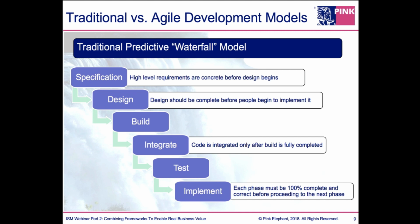We've got to make sure, especially when we have a tightly coupled build, that we have dependencies outlined, that we know specifications for one piece that needs to fit into another piece. So when you're building a predefined blueprint for a fighter jet, for example, we're not going to adapt and iteratively find our way to that replication. Now, to qualify that, we might do prototyping and the original development of that fighter jet in more of an adaptive approach. But once the blueprint is set, we're going to move to a more predictive waterfall model.